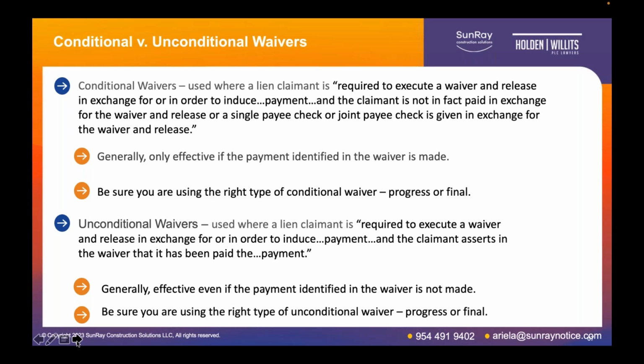Under our statutes, that should not be done, because you'll see in the forms that the unconditional waiver says that you've received payment and that payment's good and you're signing off on that. And you can waive your lien rights even if you don't receive the payment, or the payment ends up not being good. So it's real important with unconditional waivers to make sure that you've received the payment and that payment has cleared before you sign that form.